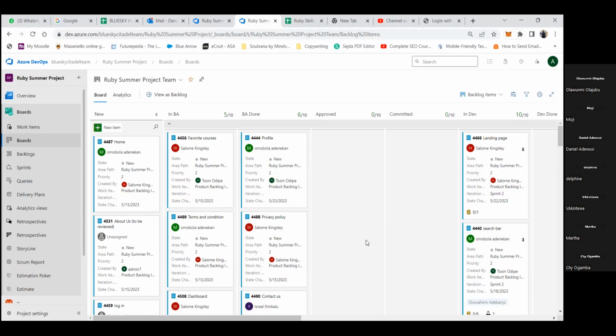But if the developer has completed, and it's just the tester that needs to work on it, again, it depends on what is left for the tester to do. If the tester has not started work on it at all, I would state my opinion now. Okay, so it's a team agreement. If the tester has not started work on it, I would say let the whole thing the way it is go into the next sprint.